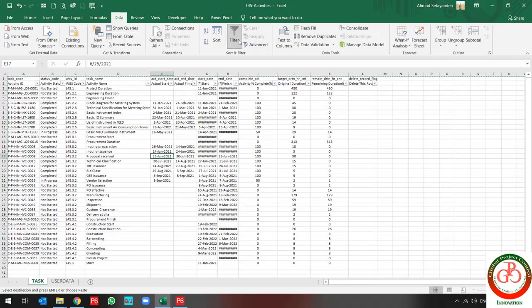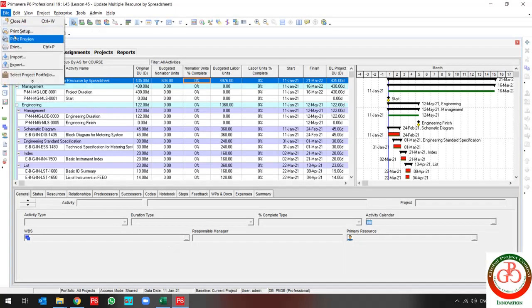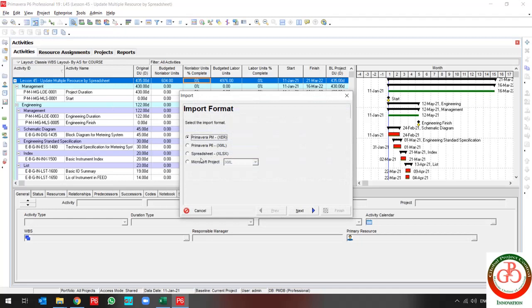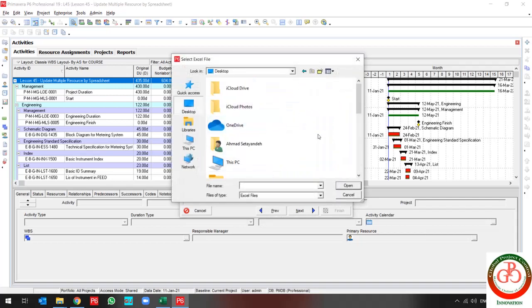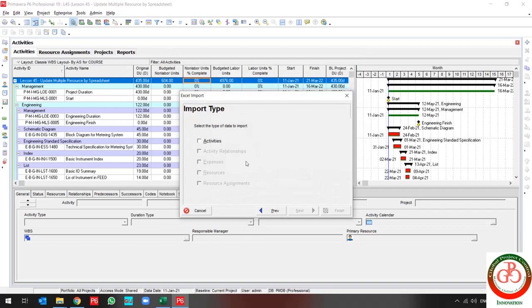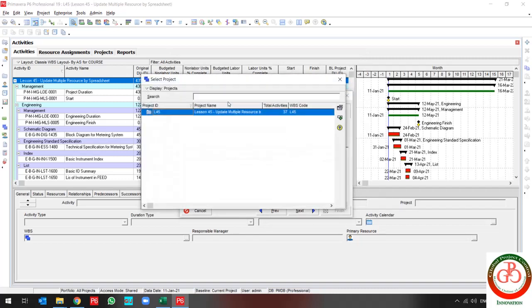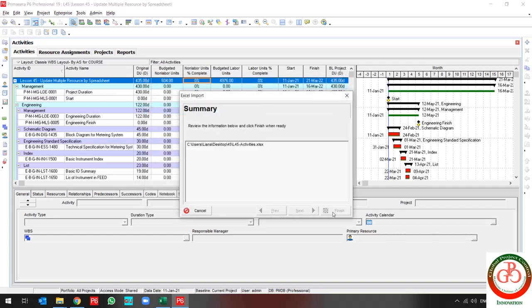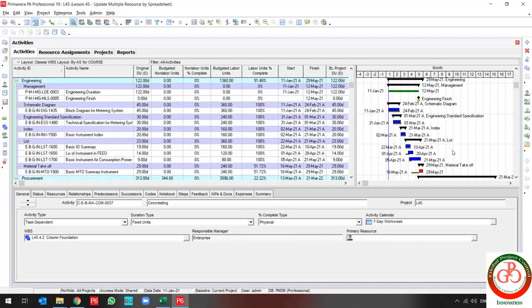My file is ready to import. Use save. Import by a spreadsheet, find the file location, and update my project. My activity status is now updated.